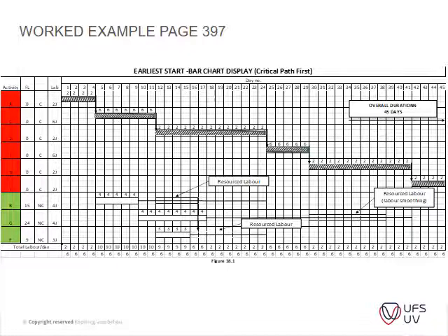the example on page 397, so you guys can go there. Basically I'm just reading there on figure 18.1 illustrates a 45 day project with 9 activities, A to I. A, C, D, F, H and I are all on the critical path. And activities B, G, and E have a float of 15, 24, and 9 days respectively, with a total time period of 45 days.